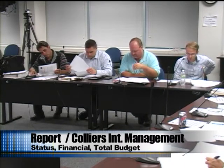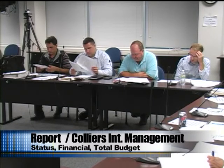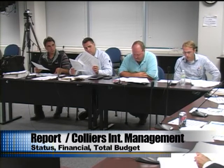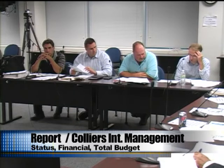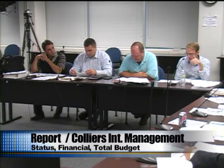So in terms of contingency, we have spent, the delta between the credits and adds thus far is $13,600 out of contingency as a net. We have $9,600 over in overages and soft costs. So our current contingency with what we've paid out to date, we are at $279,600. That does not include anything that we are putting on the table tonight or any exposures that we have listed in, also attached in this packet.